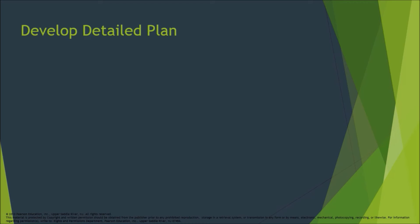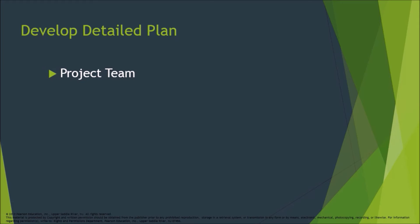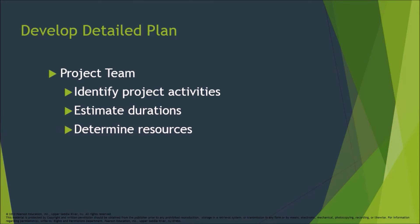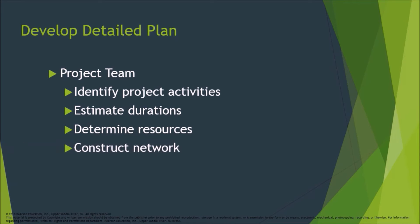Develop detailed plan: Project team, identify project activities, estimate durations, determine resources, and construct network.